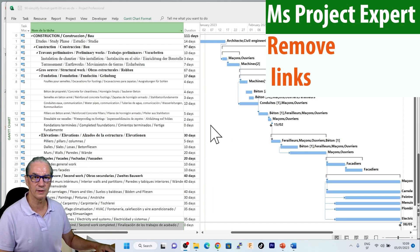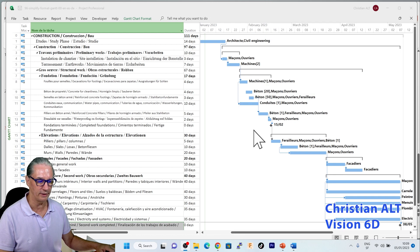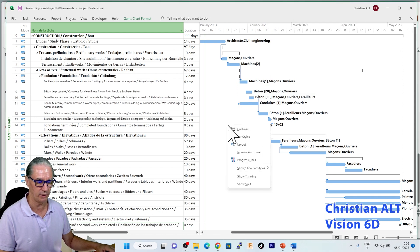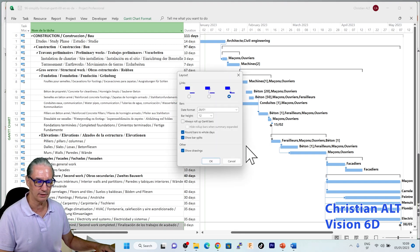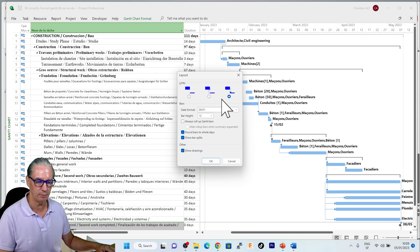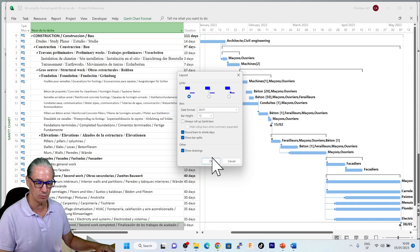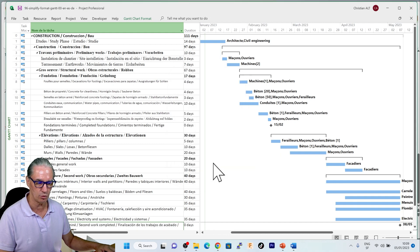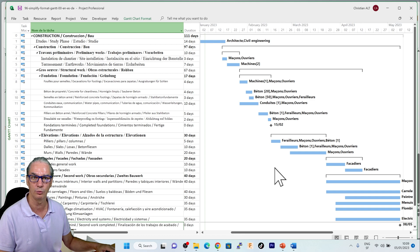The first thing I'm going to remove are the links between tasks. For this, I'm going into the Gantt chart part, right-clicking on it, and then I select Layout. You can see that we have several possibilities here, among which one is without any links. So this is what I'm going to choose, and you can see that all links on the diagram were removed.